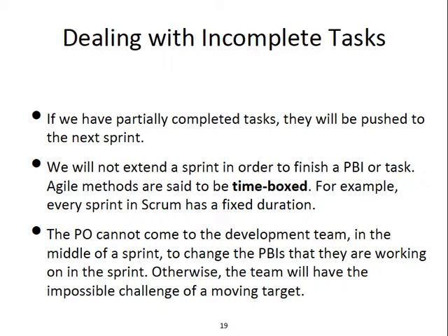Okay, the answer is in Scrum practice, you never extend a sprint. You would mark those tasks as not done. You just mark them because they make sure that they stick to the time box. The concept of time box means the duration of a sprint is fixed. You would just push off the unfinished tasks to the next sprint. You do not change the end date of your sprint. Okay.